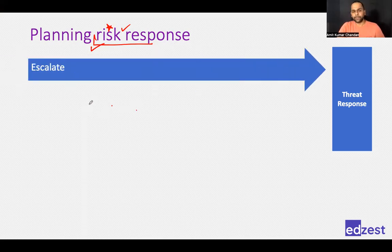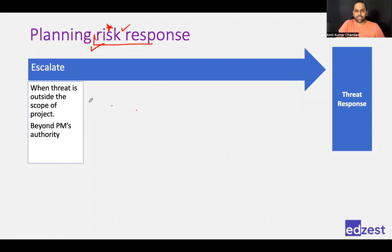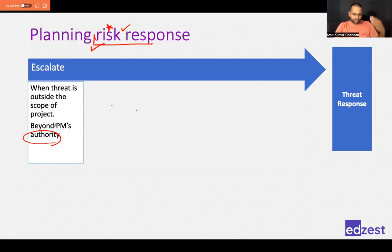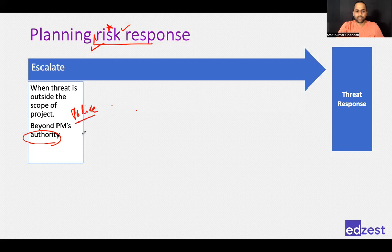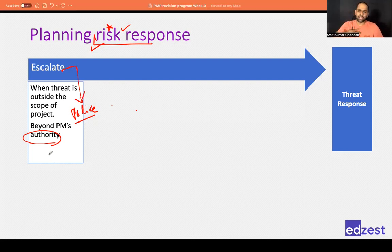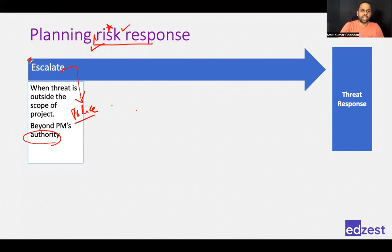The first risk response is escalate. If you come across a risk that is not within your authority — you cannot do anything about it, you don't have the expertise — you escalate. For example, if material might get stolen during transit, it is beyond your authority to fully protect it; you might need police support. There are many things beyond your authority or team expertise that require escalation. Once you escalate and receive guidance, you incorporate it into your planning.